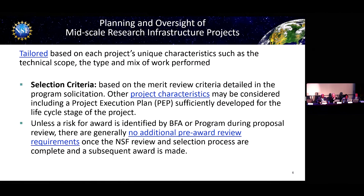We'll talk about planning and oversight of mid-scale. Mid-scale has unique characteristics based on scope, type, and the type of work performed. Review criteria are ruled in the program solicitation. One key characteristic many are familiar with is the program execution plan, developed over the life cycle of the project. Unless a risk for award is identified by BFA, there are usually no additional pre-award review requirements. Once NSF selection is complete, the subsequent award is made.